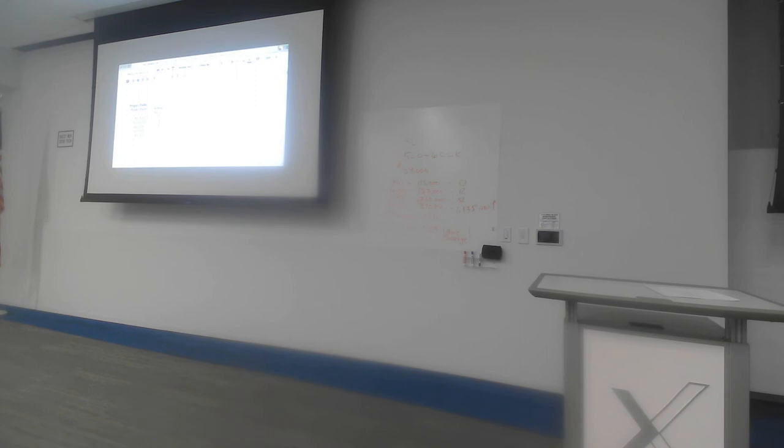So for instance, in the critical path, which is this first project path that I've listed here, the normal duration with I having a normal duration of 3 gives me an overall project duration of 20. But once I crash I, and again I'm just going to put I and an asterisk there, because I is on that path, that 20 reduces to 19 because I've crashed I from 3 days down to 2 days. And it will have the same effect for all the other paths that I is on. They will all reduce their durations by 1.